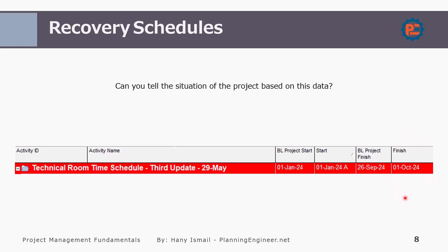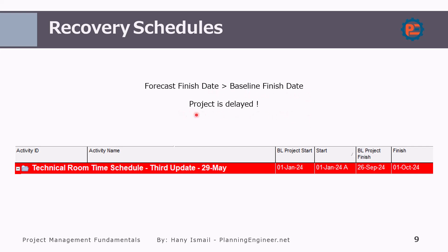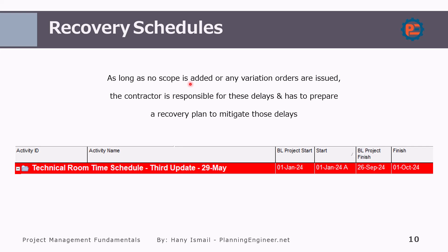I know this is a forecast date and not actual because there is no letter beside the date. If you haven't seen the lesson on how to read from a Primavera time schedule, I highly recommend going back to check that lesson. So the forecast finish date is greater than the baseline finish date — it means the project is delayed. You might see that planned percentage and actual percentage do not tell the whole story; you need to also see the planned finish date and forecast finish date. As long as no scope is added or variation orders are issued, the contractor is responsible for these delays.